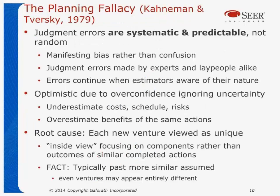If you look at the planning fallacy — this is part of the work that won the Nobel Prize — what they found is that judgment errors are systematic and predictable, not random. We can predict that people are going to make errors in judgment, that they're going to manifest bias — not just confusion — and that even the experts are going to make errors as well as lay people. Errors continue even when the estimators are aware of the nature of the errors. Even when we know that we make errors, we still have the bias.